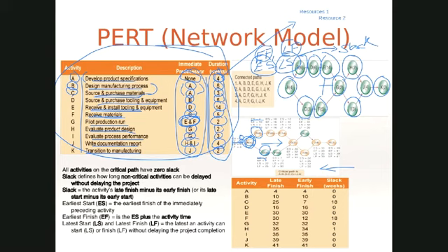So you're saying B begins only when A ends. It takes 6 weeks, so the earliest B can finish is week 10, which is nothing but begins at 4, 6 more weeks to finish it. On the other hand, for C, it also needs A, which means it begins week 4, but it requires 3 weeks to complete it, which means the earliest it can finish is week 7.